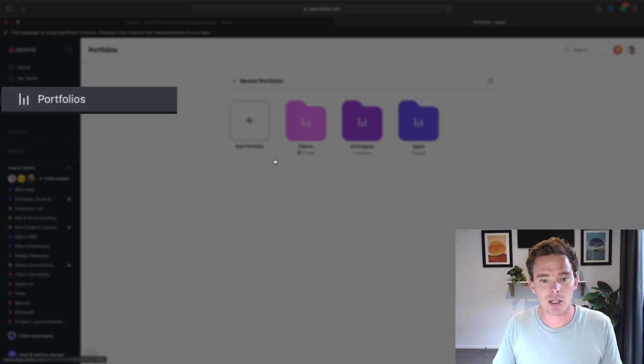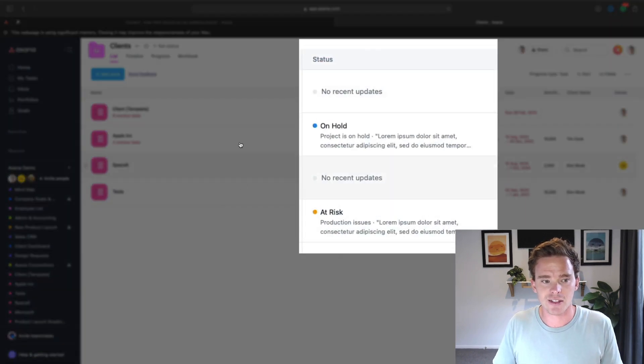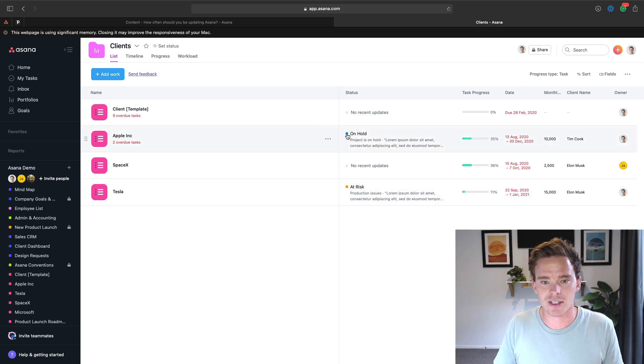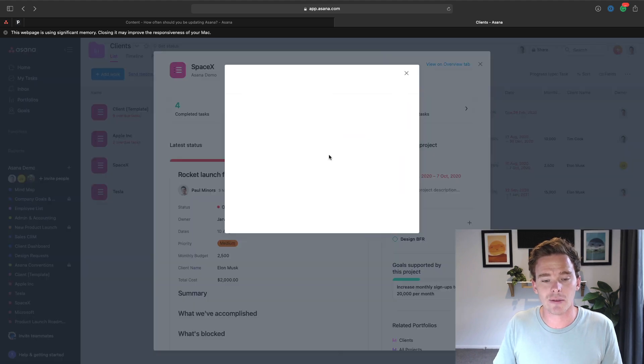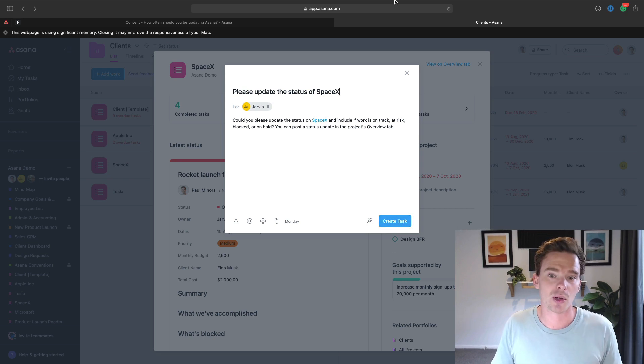If you're on the business plan using portfolios, you will see the statuses on the portfolios screen as well. Here I can see some clients I'm working with — this project is at risk, this one's on hold, and a couple don't even have a recent update. What I can do is request a status update and assign a task to the project owner to have them post an update. Especially if you're using the portfolios feature, you really want those status updates updated at least every week, otherwise the portfolio isn't showing a real-time representation of where different projects are at and it loses its value.